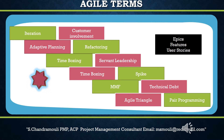Third, time boxing: it is a fixed time frame within which the team tries to achieve the planned tasks for the iteration and stops the iteration as soon as the timeline is over. Iterations follow a consistent, unchanging schedule in which each activity is executed, called time-boxed events. For example: demonstrate finished iteration outcome — up to one hour; hold retrospective on previous iteration — one hour; plan iteration — half an hour to four hours. This helps the team stay focused and avoid spending time on low-priority tasks.